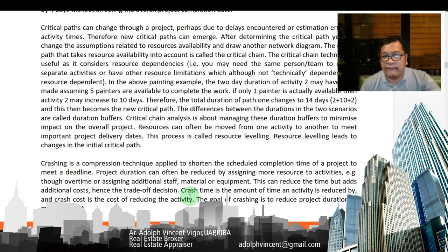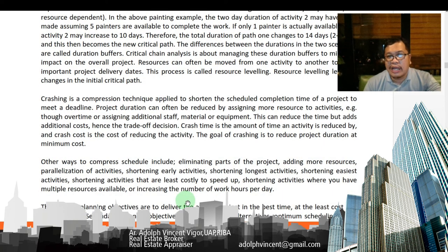Resources can often be moved from one activity to another to meet important project delivery dates. This process is called resource leveling. Resource leveling leads to changes in the initial critical path. So crashing is a compression technique applied to shorten the scheduled completion time of a project to meet a deadline.